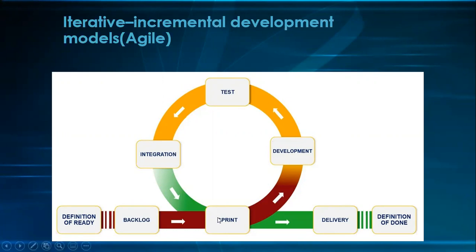We open a new bucket, which is a sprint, a different one. We'll pick what we want, little things; we don't want it too heavy. We want it just little. So from there, we pick it and put it into the sprint. This is what we want to do: login is what we have for sprint one. From sprint one, everybody starts preparing. We start laying our testing bed in terms of test prep, our scripts, our planning, and make sure everything is ready before deployment to the test environment.